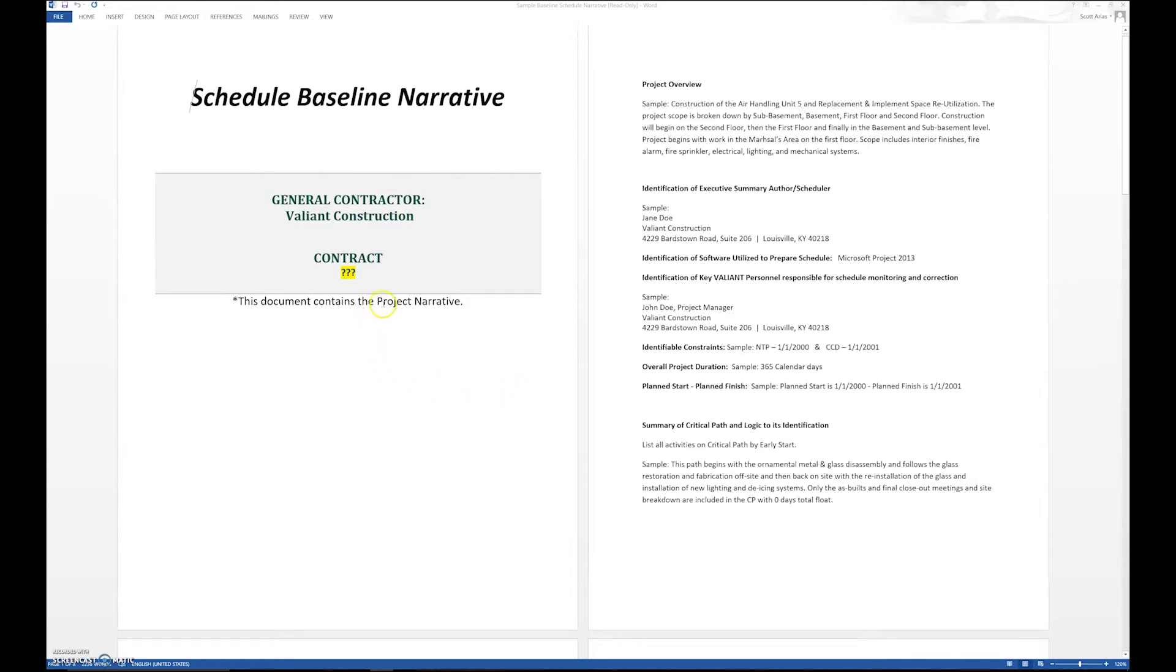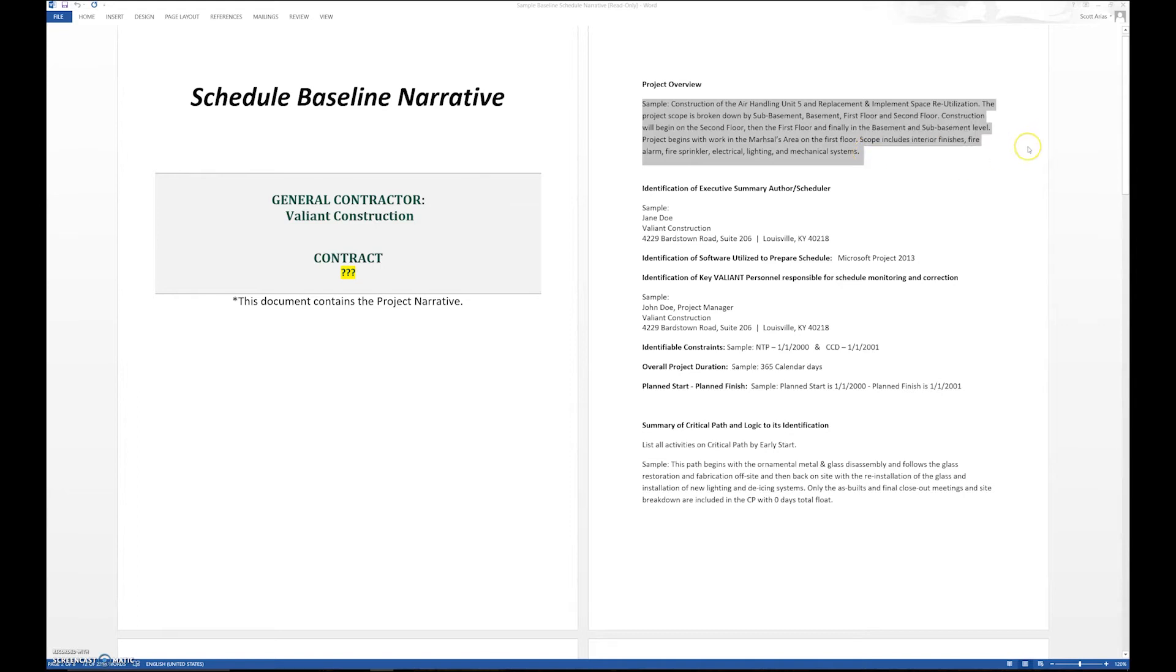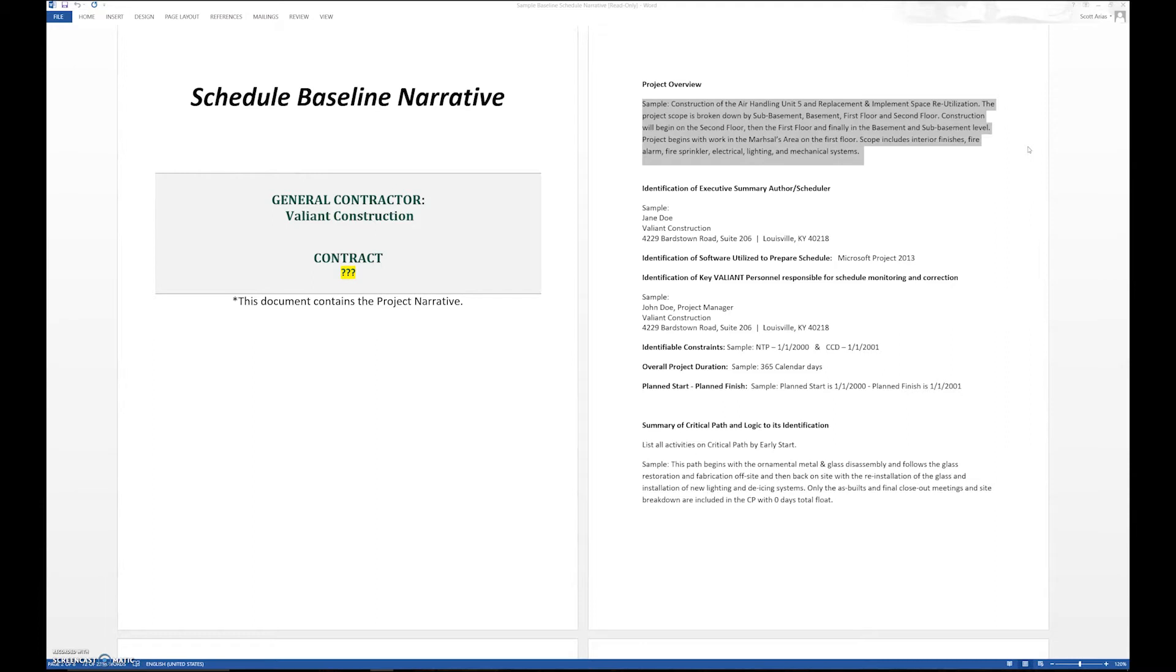It contains the project narrative and you can see the project number would be filled in there. You do an overview, and usually this is the scope of work given to you within the contract itself. In this example here, I gave a sample of an air handling project replacement. You give an overview so if someone was sitting down to review the schedule, they could relatively quickly understand what the project is.